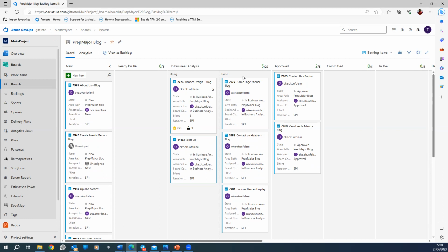In fact, the first time you're meeting with your product owner, you're going to get your product mandate. So you're asking the right question: what's our product mandate? What project are we working on? What is required of us? And they tell you some vague description, and then you start digging. In order to do this, what should we do? How should it be? What's the layout? This is where you do your requirement elicitation. And then you go and write up the user stories, starting from the epics, the features, the user stories.